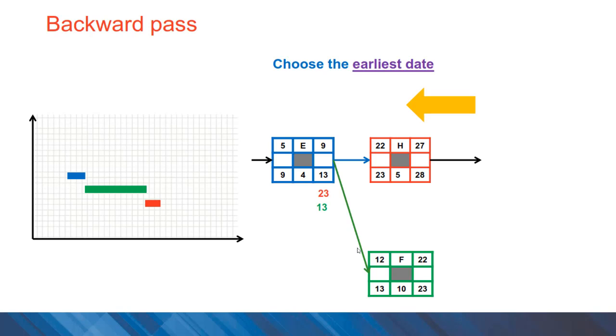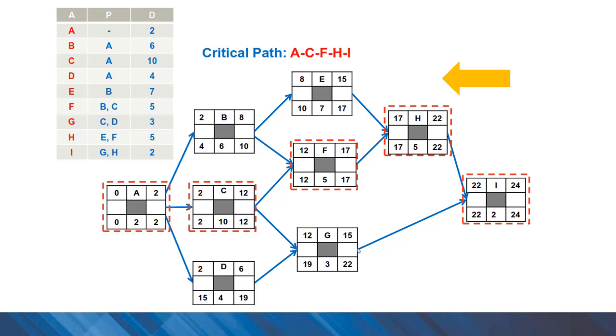As you can see in this example, for activity E we have two choices for late finish time: 13 coming from activity F and 23 days coming from activity H. The rule in the backward pass is to use earlier dates. Here we can calculate the late start and late finish values in the backward pass. A good control for us is reaching zero as the late start time for activity A when we reach the end of the network.